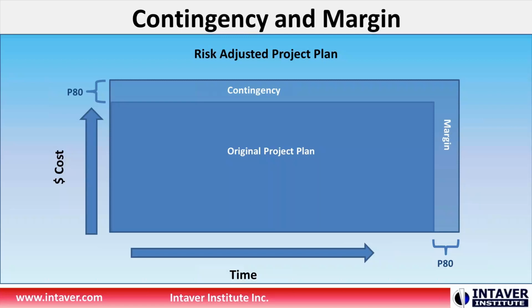And one of the reasons this is good is that you can apply this certainty as a standard across all of your projects. It means that when you assess your projects and do an analysis at a portfolio level, you can see the risk and cost based on a standardized level, what we call certainty or confidence levels, in terms of how many resources or finances you're going to have to put aside to cover that risk and uncertainty in those projects.